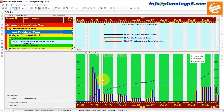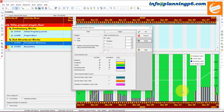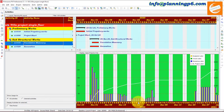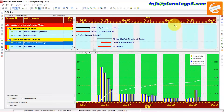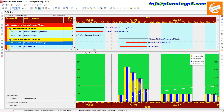The other thing is how we can manage these values if the profile is flat or something. In the Activity Usage Profile, there is an option — if you select the baseline and apply, the baseline will also show here with its own color. You can see it. If you want to expand this one, you can do so. These are the baselines now — this one is accumulating and this one is the cumulative for the viewer's project.